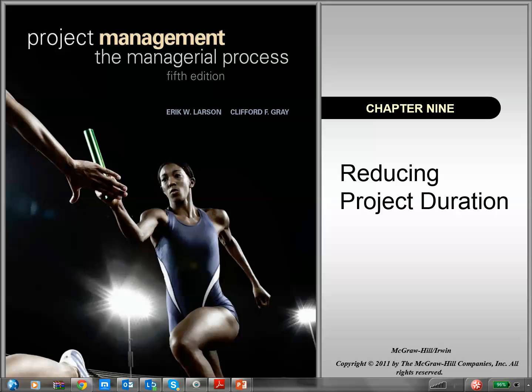For example, remember the 3-point estimates and how they led to a weighted average for the estimate of the project duration. And if you remove any time from that, you're going to go below 50%. The estimated average time of achieving a project schedule, based upon 3-point weighted average analysis using PERT, has only a 50% probability. So if you remove time from that, the probability goes down.